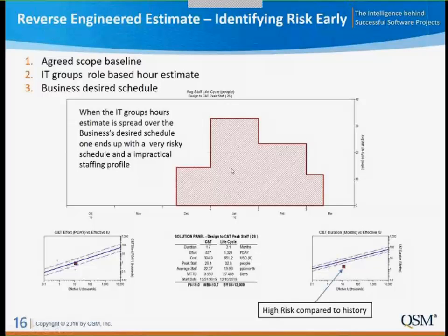And moreover, if they staff up like this and they don't make this schedule and they slide closer to up here, that means they're going to be chugging along at 30 people for another 4 or 5 months, and they have double the cost of their program in terms of an overrun, which wreaks havoc on the budgeting. The budgeting scenario at the portfolio level. So we want to capture these things as early as we can and start to look for more reasonable types of scenarios.